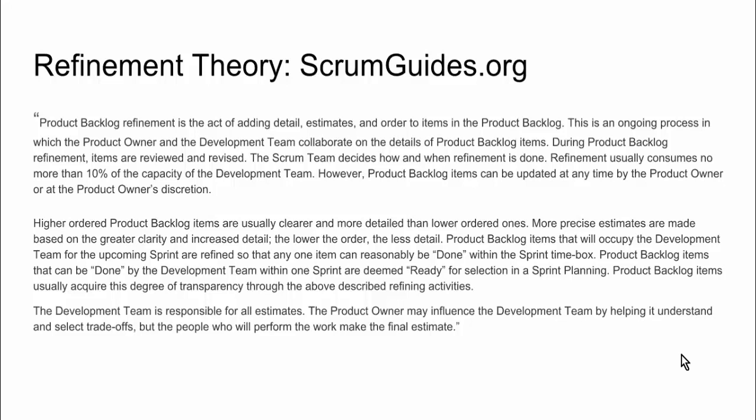So it's typically the case that backlog items are more refined near the top of the backlog. The things that are about to happen, that are about to go into a sprint, are super detailed, okay? They're estimated, they're ordered. And then lower in the backlog, you have less detail. For example, there may be some stories that are still epics that don't fit into a sprint, okay?